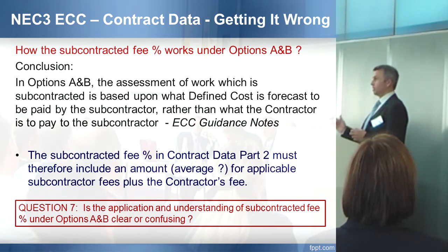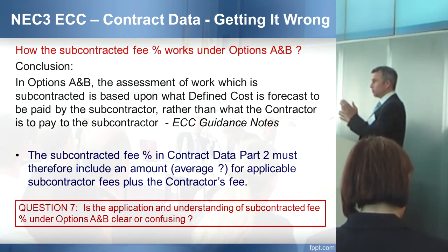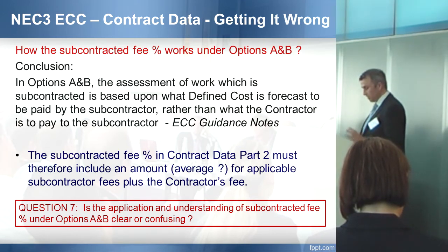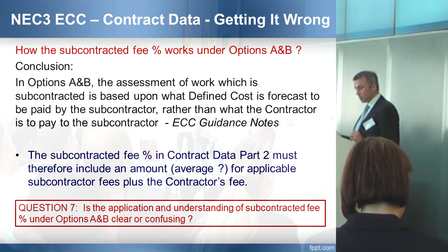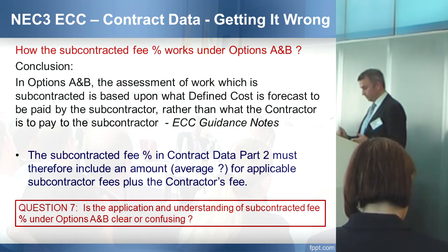We don't really know who we're going to be employing as subcontractors further down the line. Generally speaking, the smaller and more specialist the subcontractor you employ, the higher the overhead and profit will probably be. So there's a certain amount of guesswork here. So I can see some difficulties, and I can also see two arguments when the express terms of the shorter schedule of cost components, which is a contractor-employer document, talks about the cost of a person.